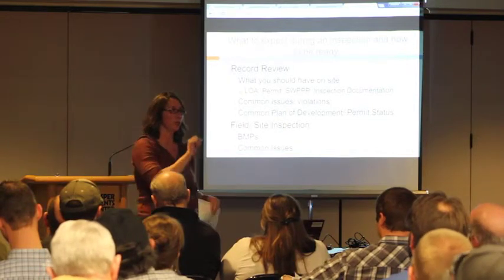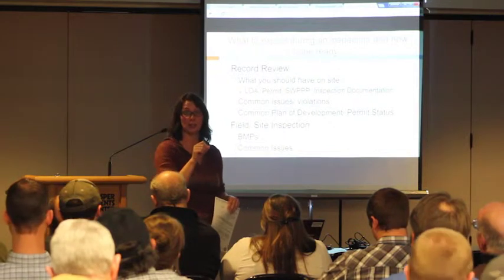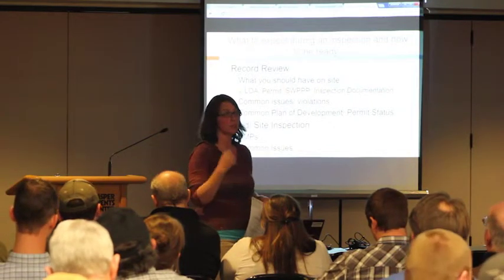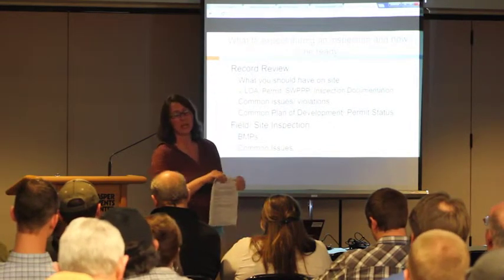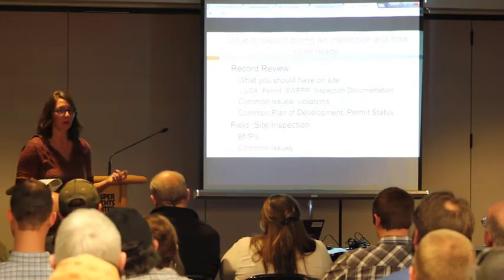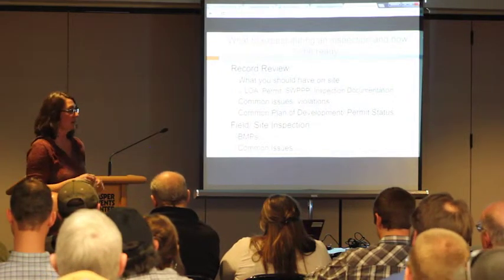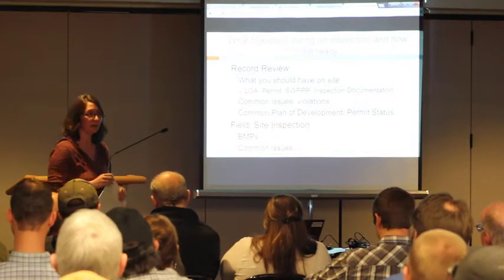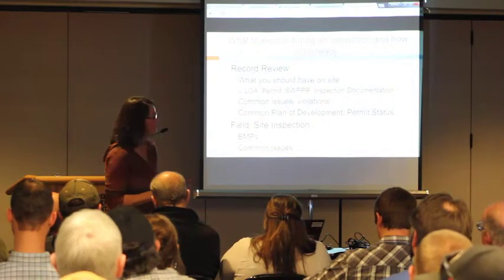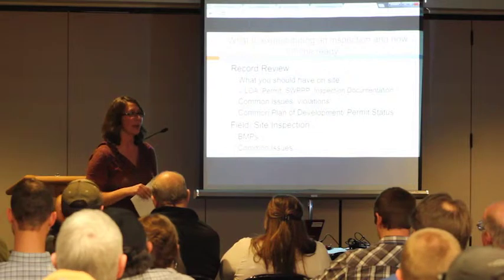It will tell you when specifically you are authorized to start construction under that permit, so when you can start discharging under that permit. It also will give you your termination date, which you have selected when you submit your permit to Barb or John in Cheyenne. And like I said, you get to select that termination date. We're going to talk a little bit about that.